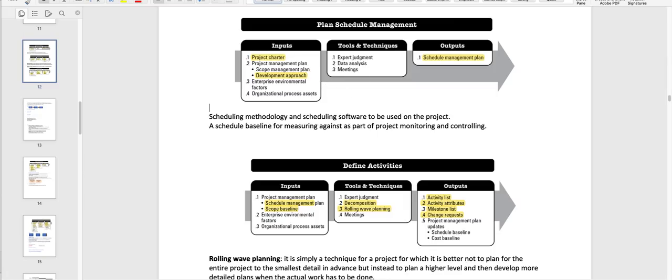What you have to know about the plan schedule management process is that it involves documenting how you will plan, manage, and control the project to the schedule baseline, and how you will manage the schedule variances. As I have said, it is nothing more. In a plan, we're going to talk about all the activities, like define activities. Let me show one more thing to you.